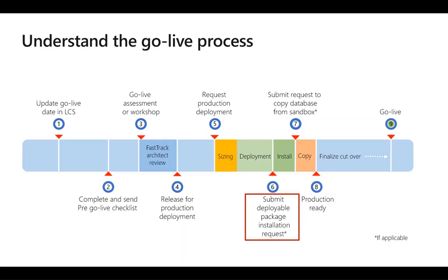Generally, 95% of the updates are applied in less than 1 hour. However, Microsoft still recommends that we provide a downtime window of 4 hours in case a rollback is required for any reason. When the package deployment succeeds, the environment will be available as soon as the package deployment has finished, which means that the longer downtime window does not have any negative effects on system availability.